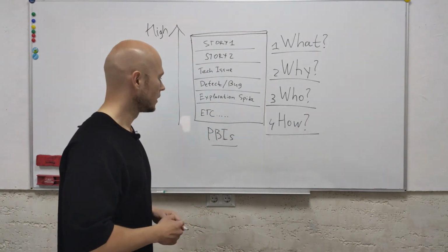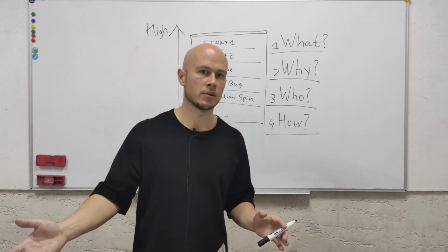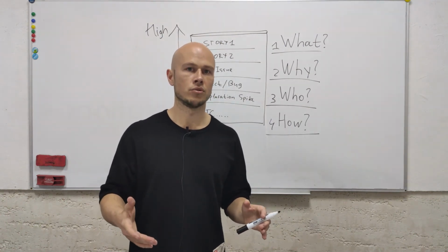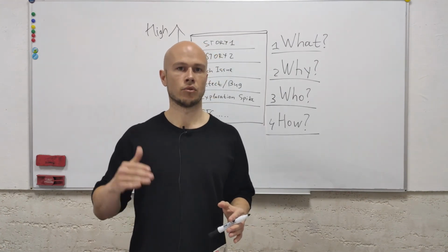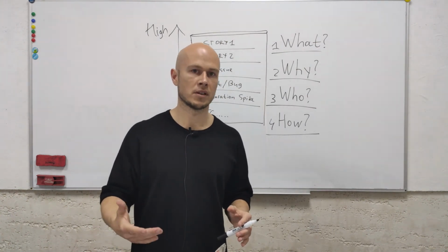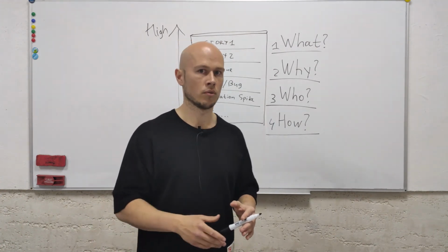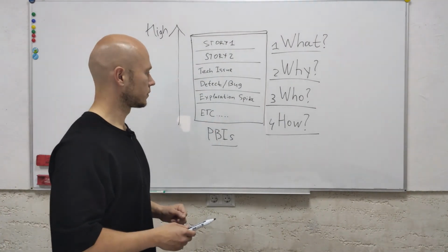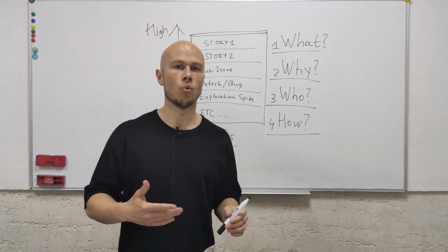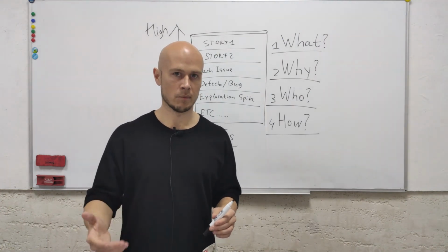So it's first and critically important source of feedback, or actually source of items for the backlog. The second is business. Business could be represented by sales department, by marketing department, and these people usually try to increase ROI of the product. So return on investment should be higher and they are thinking how to make this. So business represented by different departments including marketing and sales are the second major source for the product backlog. And finally, the third major source is our development team. People who work, who develop the product, they also know the product very well and they could give valuable feedback.